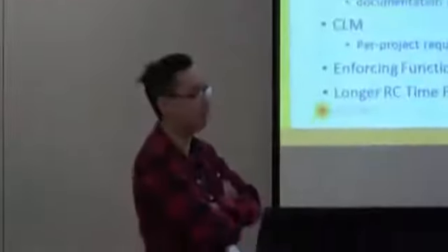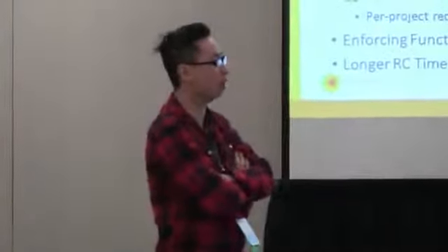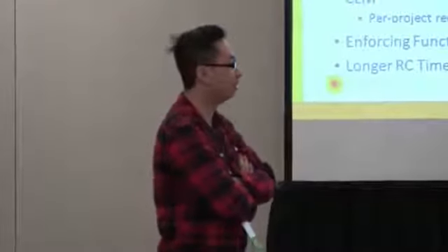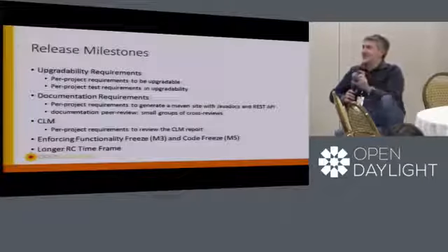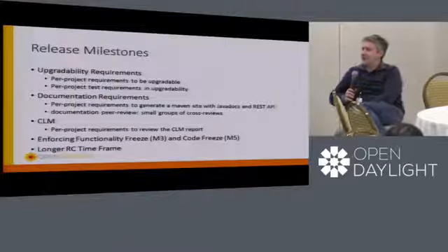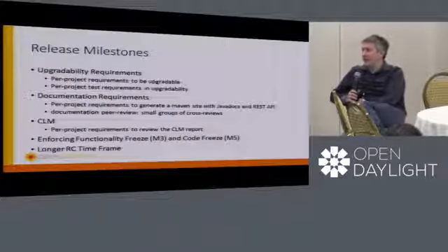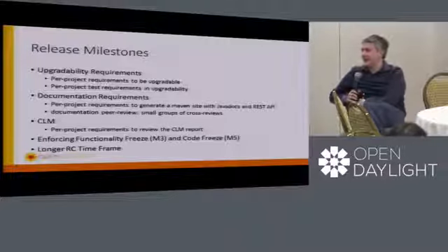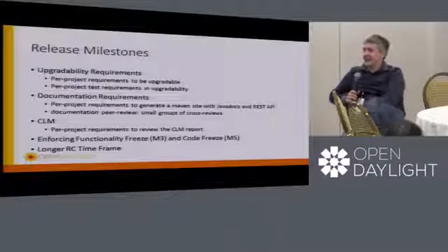Right. Are there any other release milestones that we should update or add new requirements to in the Boron release, assuming that we don't do the fast-paced one? So one of the things I realized with the existing release milestone is that with the existing cadence of 6 months, giving only, I think it's 4 weeks we are giving now, or maybe 5 weeks in the end to do all the testing and the release candidate and testing on that, it seems short always.